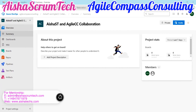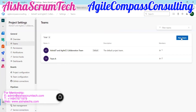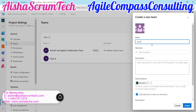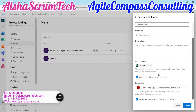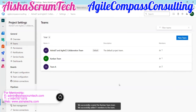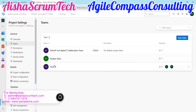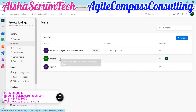I'll go to Project Settings, then go to Teams and create a new team here. I'll call this 'Kanban Team.' You can add new team members there, and you can also add yourself if you want to be part of it. You can also add new admins to this board. Create an area path with the same name as your team — that's so everyone can understand them. So we hit Create, and now we have our Kanban team.